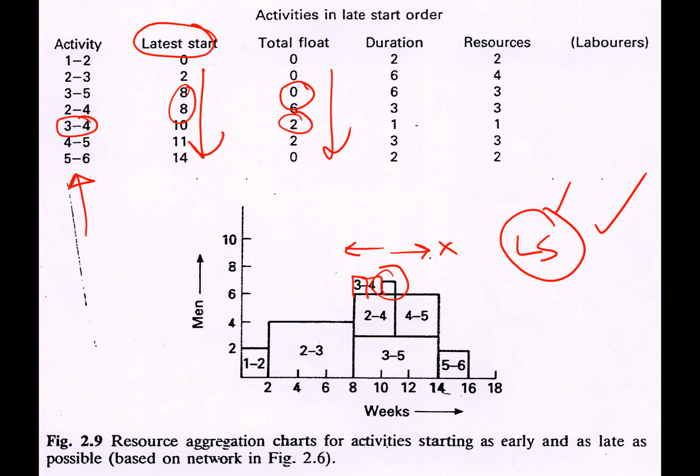That's why when you want to move activities, you can move a few activities, not just simply one. One will not make the graph look hugely different. But in this situation, the graph looks good already. Maybe you just simply move activity 3-4 to the most left here, then it's settled. Okay, because it's only 2% extra on that particular day, so that is not too problematic. Okay, you notice we do not change anything. 16 days is the end of the activity, so we remain at 16 days.